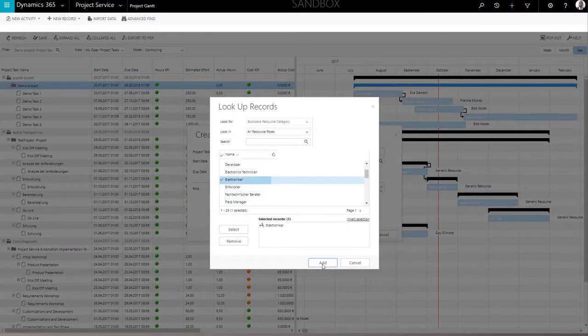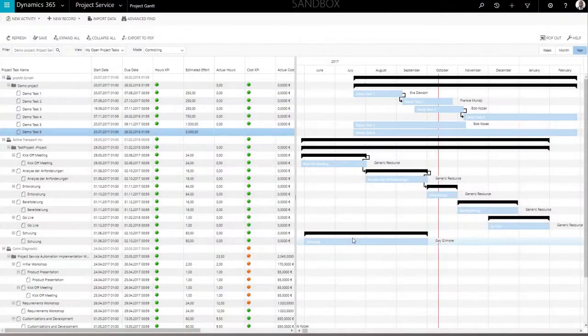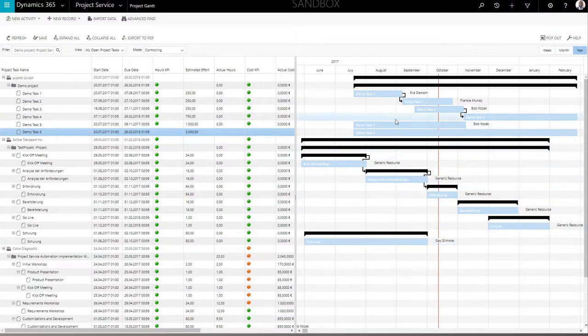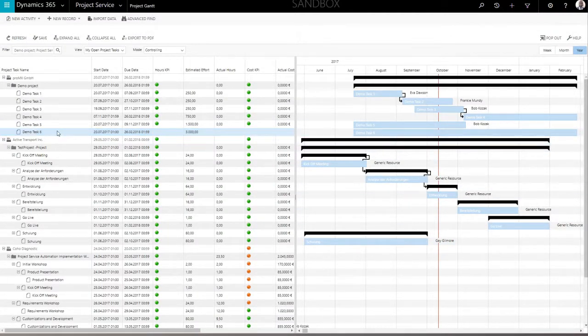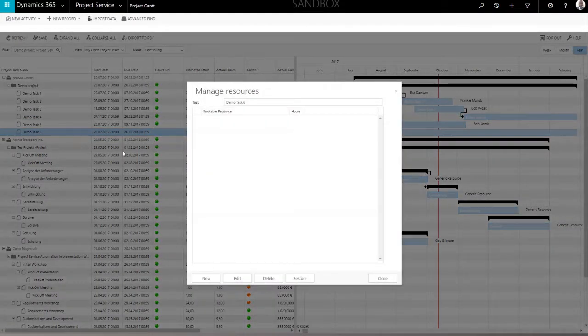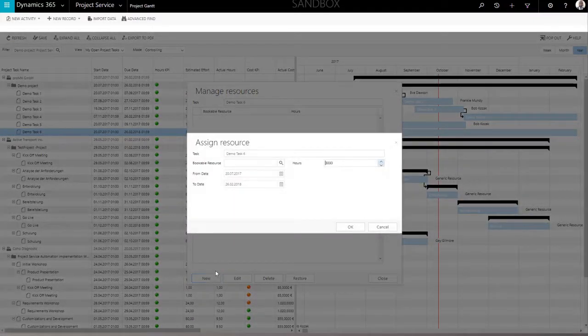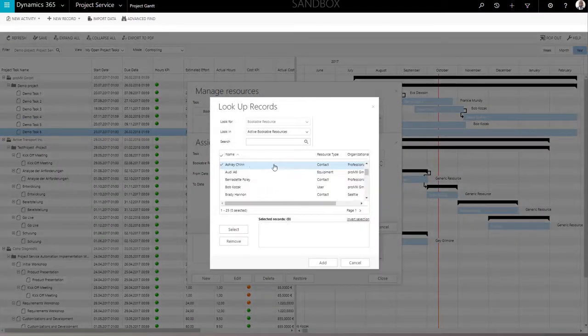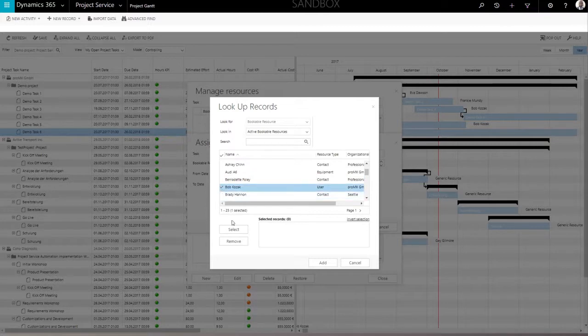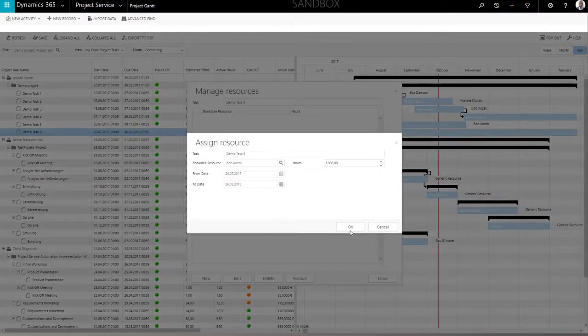The next step in project planning is assigning a resource to the project task. To do so, select the task and open the context menu with a right-click. Select the Resources option. You now see a list of all resources assigned. If there aren't any, you will see a blank form. Use the New button in the lower left corner to assign a resource. In the pop-up window, fill in all required information and confirm the creation by clicking OK.